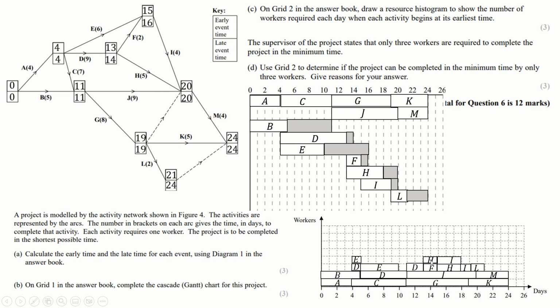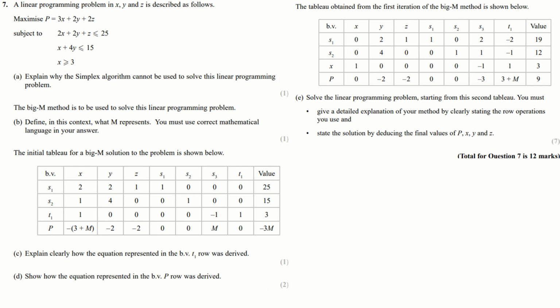But then you've still got this H to deal with, and you can't move it much later. And even if you did, all of these rows are being used now, and you can't move it any earlier, so there doesn't seem to be anywhere to put any of those 2 boxes. The other way to think about it is just to say, well, nothing can start before this time, ever, aside from A and B. And now you've got 1, 2, 3, 4, 5, 6 hours of time that you'd like to smooth out into this, but only 1, 2, 3, 4 blocks to put it in. So this is just absolutely impossible. So any explanation I think will do, but that could work there.